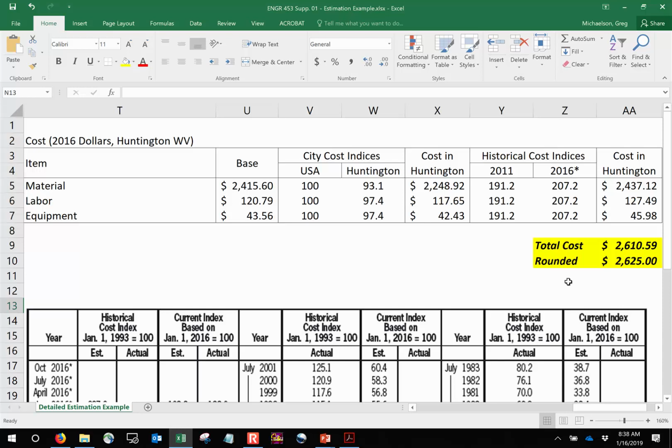That's possible, and it also depends on what we're talking about. For instance, if we're looking at a bridge, then costing the girders per linear foot makes sense, but costing the deck per square foot as a function of area can make sense as well. It just depends on what you're looking at.